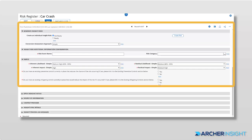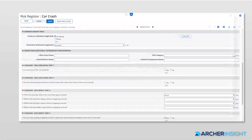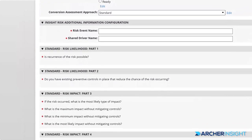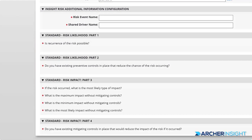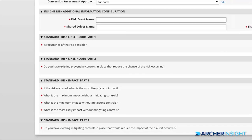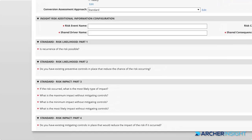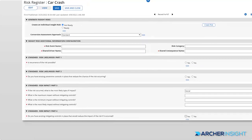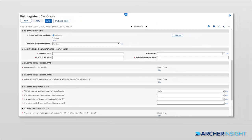You can either simply convert your existing inherent and residual risk scores, or use a straightforward and short questionnaire. More advanced users can dive straight into the quantitative approach using the global industry framework, OpenFair.